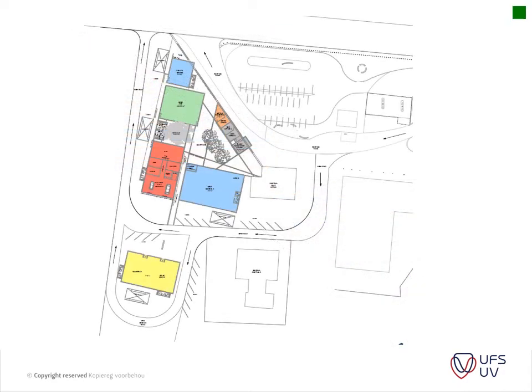What we could do, we were provided with a basic layout of the project, and we could measure all of the different elements, all connecting it to the rate per square meter calculations, and all of those rates were determined for each function. So we had a little radio station here which was a bit higher. The rate was also higher because of the square meter.